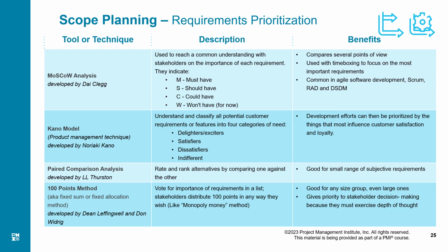Or I could give one vote to every requirement. That means I am indecisive and I am giving one vote to every one. That does not matter. If a larger audience is voting for it, or maybe even if it is not a larger audience, if there are 25 people who are voting for it, you will get a handsome result out of it. Once the voting is done, we add all the votes collected for every idea, and whichever idea got the highest vote goes on top, and then the second, and then the third. This is another method of prioritizing all the requirements.